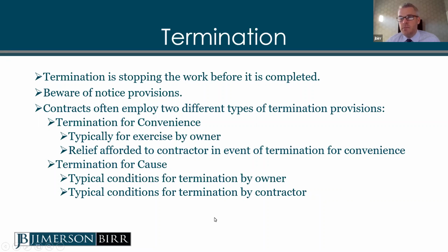Obviously, the termination for cause, that goes without saying. That's when someone hasn't performed properly. But please note in your contract what kinds of notices have to be sent. Is there a scenario where you have to give notice and opportunity to cure the default before you terminate? You don't want to be on the wrong side of an improper termination. So make sure you read your contract to know what those conditions are, what those notice requirements are. Most good contracts will spell out that the notice, whether it's with an opportunity to cure or termination, will say who it needs to be sent to, how it needs to be sent, when it needs to be sent, all of those things. So make sure you're aware of that.